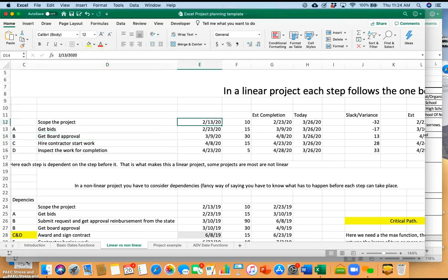Now, let's say that we have a change, and this now becomes 3/15. That automatically revises all of the other dates because everything's dependent on each other. So think of it like a snake, okay? If you change the start, all of it gets changed.